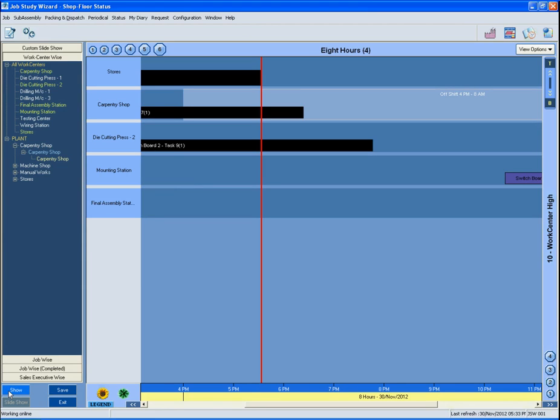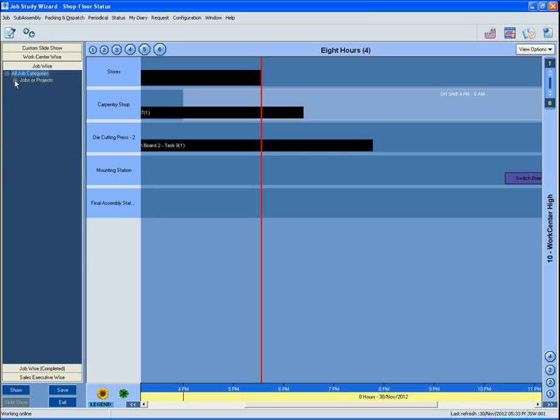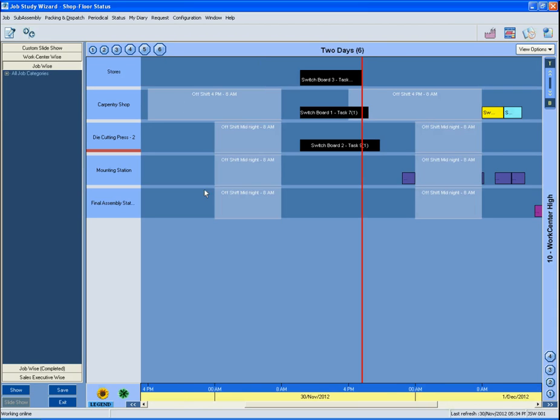The third pane is job wise with a tree view first classified by job type. Since we have just one job type in the evaluation version, all jobs get listed in one node itself. Like work centers, one can multi-select jobs to see their Gantt chart. Here, a point must be noted that the union of all work centers needed for all selected jobs is automatically selected. Further, only selected jobs' tasks appear in color.